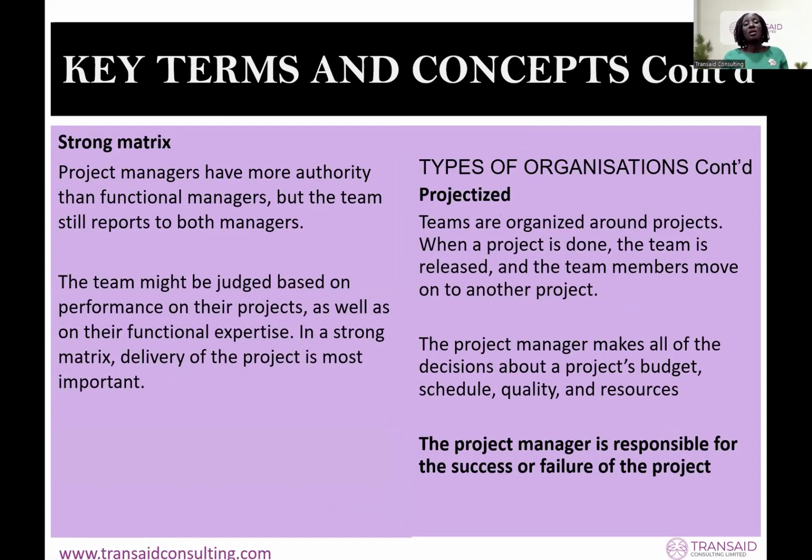But in a strong matrix, the project manager, you have more power. However, the team still reports to both of you, and they will be evaluated based on their performance on the project and in their department. We have the last one, the project organization. This is common with consultants and contractors. The teams are organized around projects. So when a project is done, the team is released and the team members move onto another project, if another project is available. If it's not available, they go back to where they came from. That's the disadvantage of this.